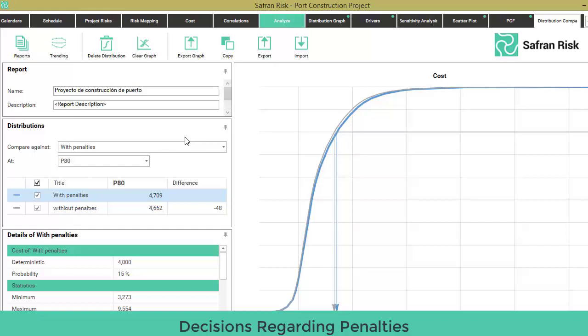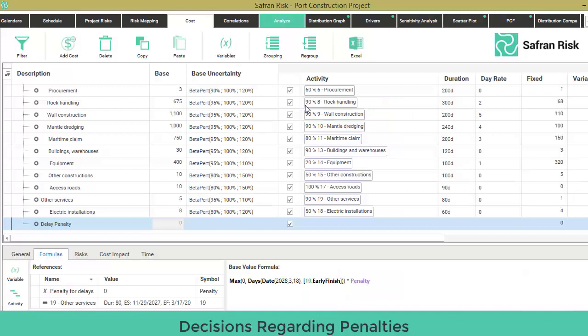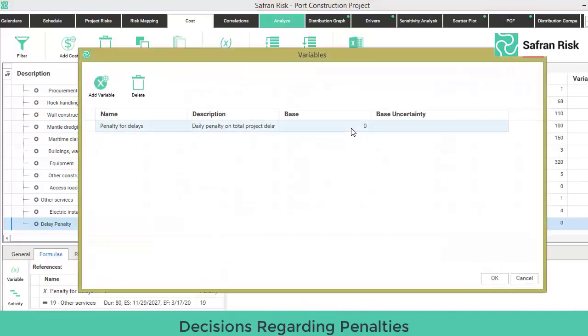In other words, there's an 80% confidence that penalties will run as much as $49 million on this project. $49 million over expected net management commissions of $120 million represents over 40% erosion of profitability gone to penalties.